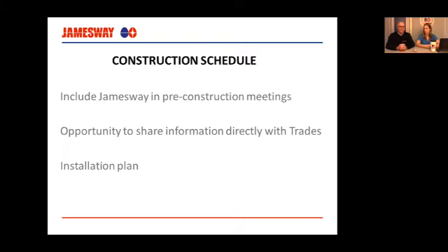If there's no communicated installation plan, our plan will be to ship and produce incubators first and hatchers second. But there's opportunities through conversations to influence that plan and have certain quantities of machines built first in certain orders. There's lots of influences that we can place on production and gain from the customers in terms of installation and construction. For sure. And one feedback that I think I've had on a lot of sites is that the general contractor manages all the sub-trades, but the customer is the one who's speaking to Jamesway.